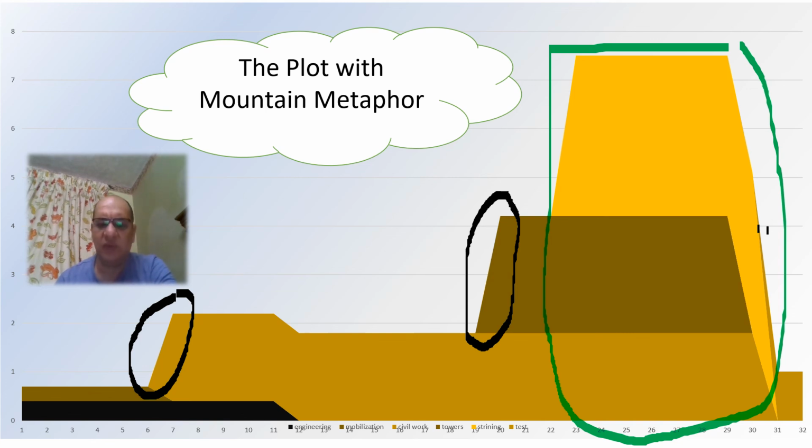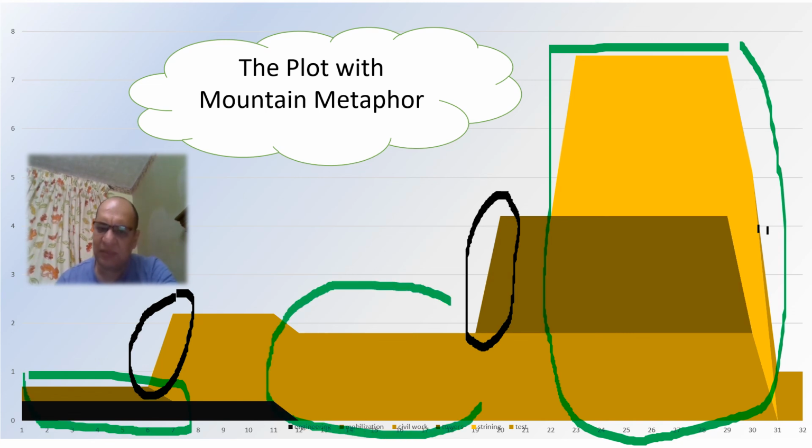We have a very slow beginning, without much value added, and some flat area in the middle. This tells us there is a trend in our information, and that the mountain maximum should be in the middle rather than shifted to the end as in this case. Things like this can be discovered after we choose a good metaphor.